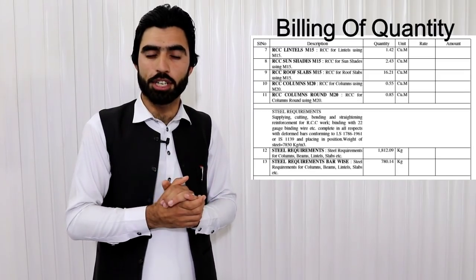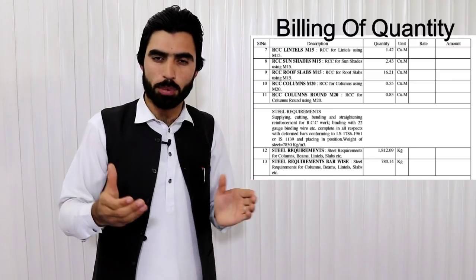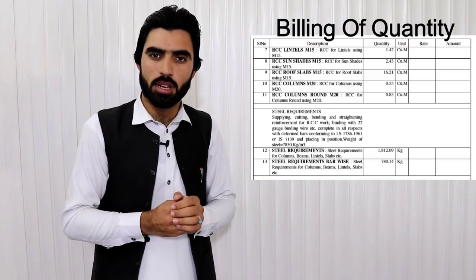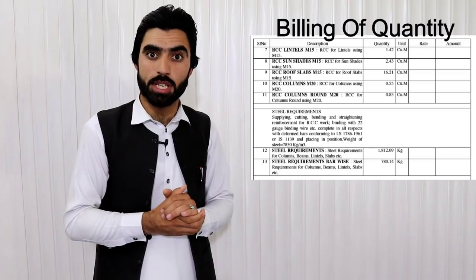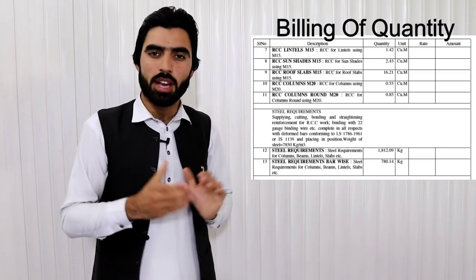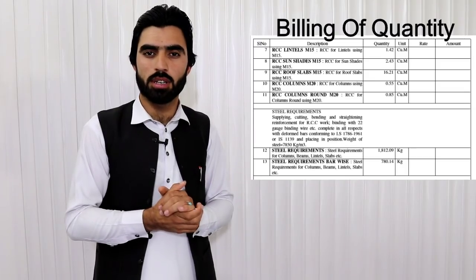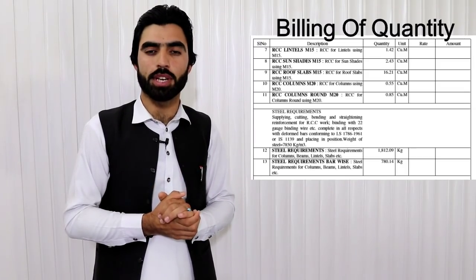The third column shows the units, because for different materials in civil engineering we have different units — cubic meter, cubic feet, etc. The fourth column shows the item rate, and the last column shows the total amount of any item. This way you can find the full quantity of any project or building. Therefore BOQ is very important; without it we are not able to find the full estimation or total amount of any project. BOQ should be prepared by a quantity surveyor with the help of drawings.